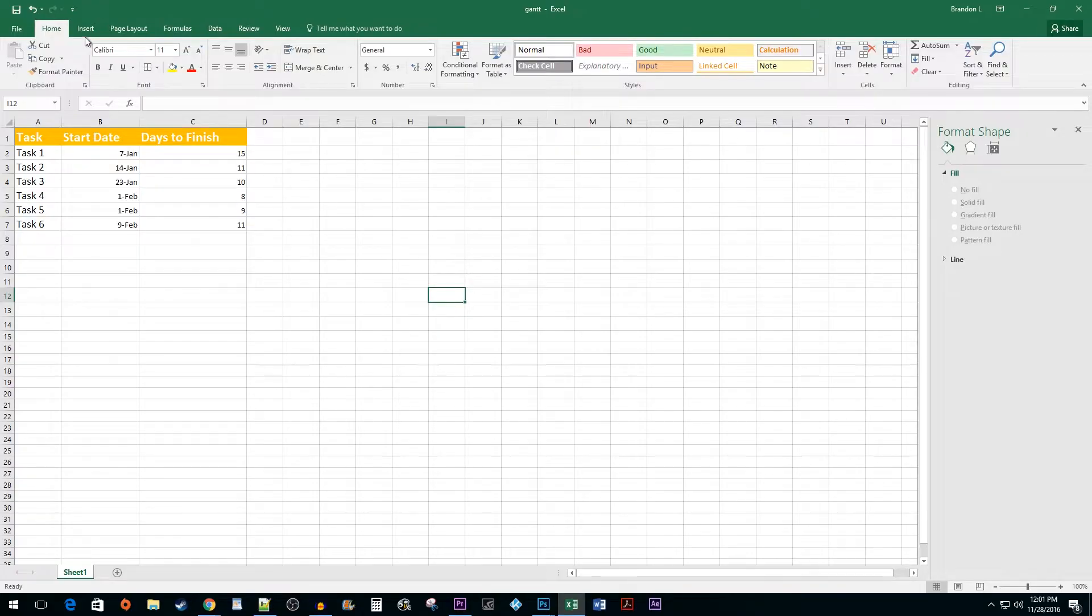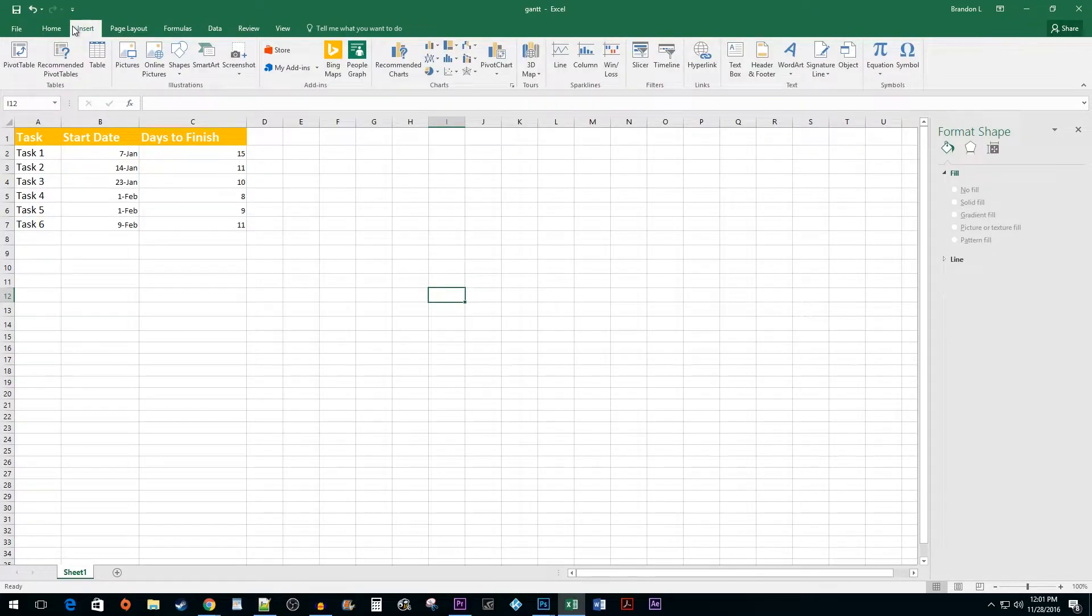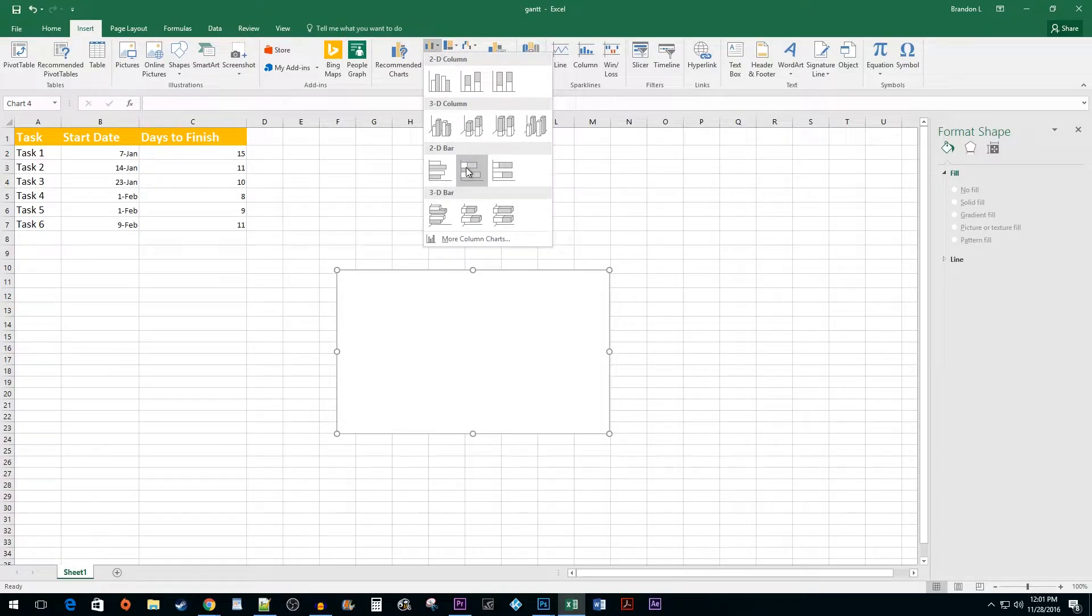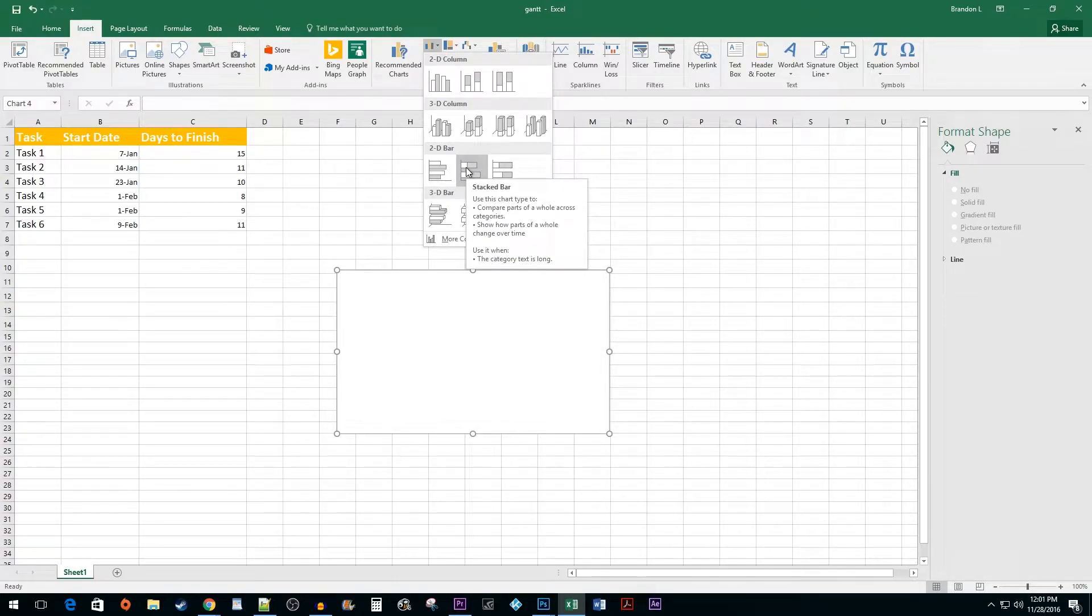Begin by going to Insert and clicking on the Bar Chart button. Select the Stacked Bar option. You can either use the 2D or 3D version.